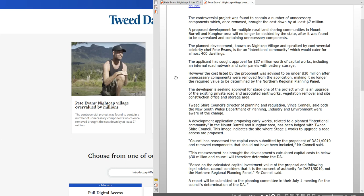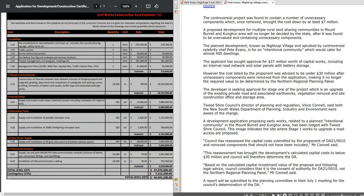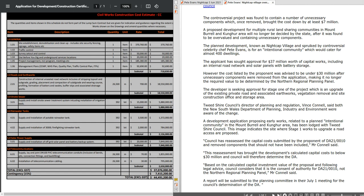Bear in mind that this particular article, all of this is about the capital expenditure that I just showed you and all about the fact of how it added up to, let me show you, here's the development application cost estimate: $37 million plus 15 percent contingency, total cost excluding GST $44.4 million. So working on the base of $37 million excluding GST, that's what the project was valued at. And because it was valued at $37 million, it was put in the hands of the Northern Regional Planning Panel, which you have to have a project worth over $30 million dollars.